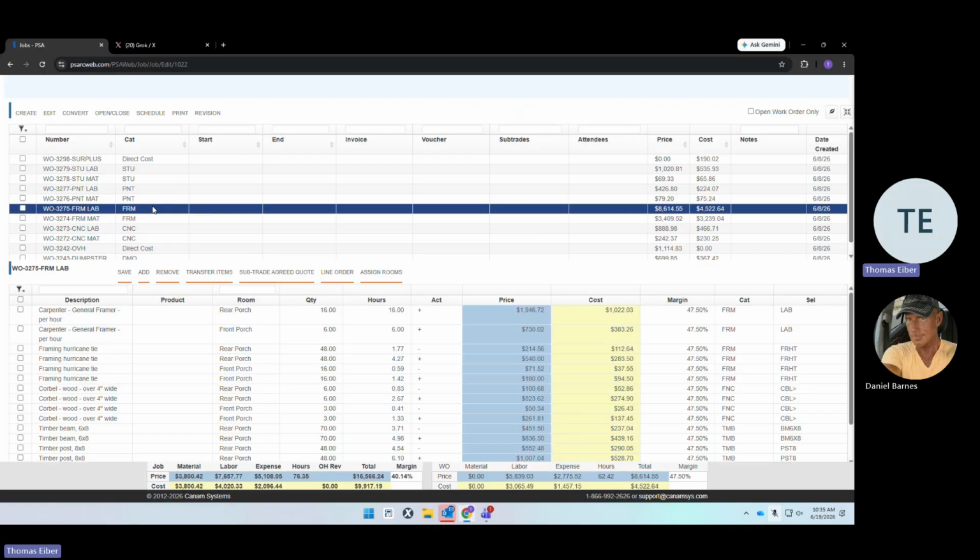So how do we use these work orders? So the work orders are used to track, manage, assign, and authorize money available to a project manager for us to purchase materials or to hire subcontractors, but also for scheduling in-house technicians.